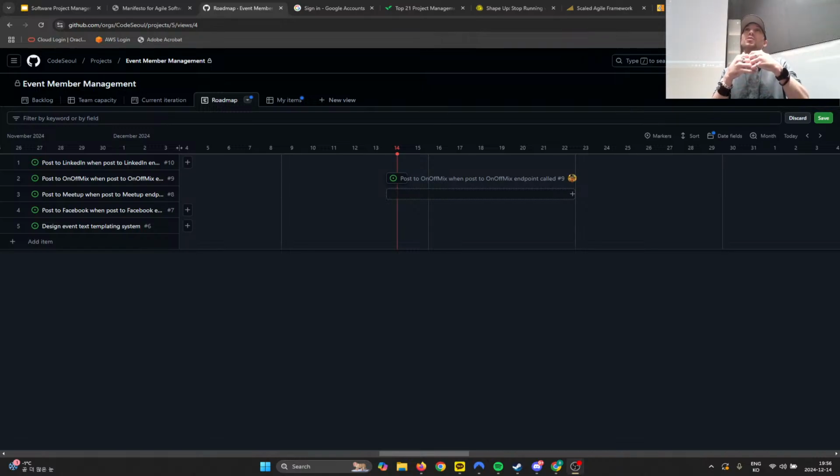So one thing we have, for example, we actually have a similar issue where our QA person handles multiple, because we only have one QA person. She handles, QA engineer, I should say, because she does code. She handles multiple projects. But we are very strict that you do not handle multiple projects at one time. You do your QA for this project, and then the next project just has to wait, and then it's on the PMs to try to make all that timing work. And so in that way, the QA doesn't have to do as much context switching, and we can be more predictable about when the work gets done.